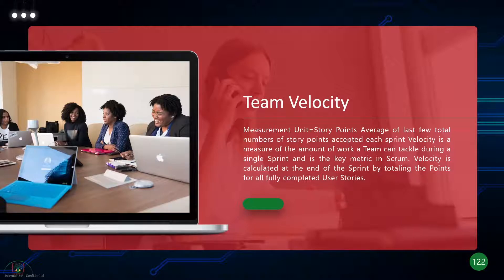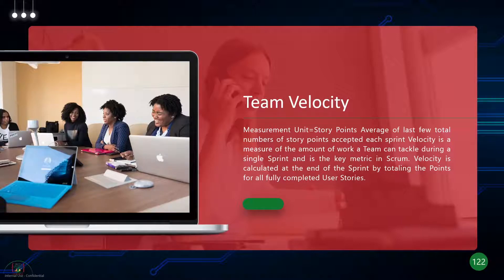Team velocity is basically the story point average calculated based on the last few sprints. It's the measure of work that a team can tackle during a single sprint. For example, if they're able to do 40 or 50 story points in a sprint, that is the team velocity. The best way is to find an average of the previous sprints.